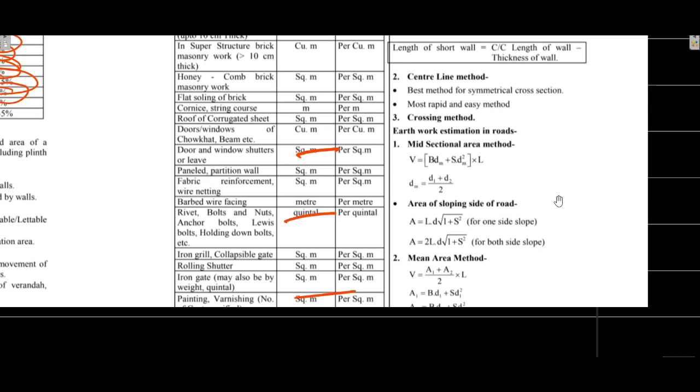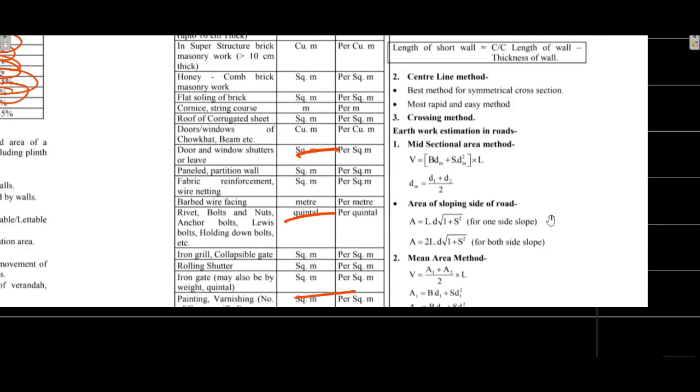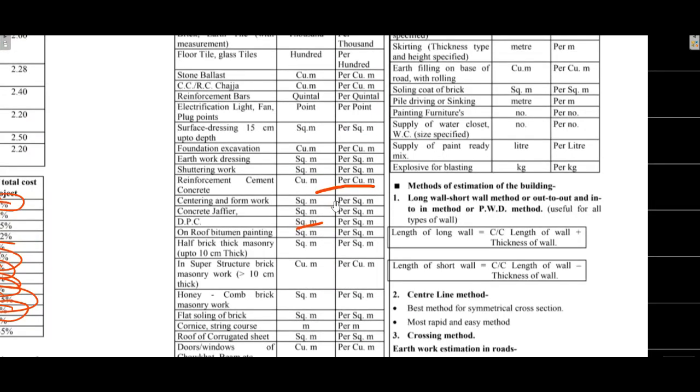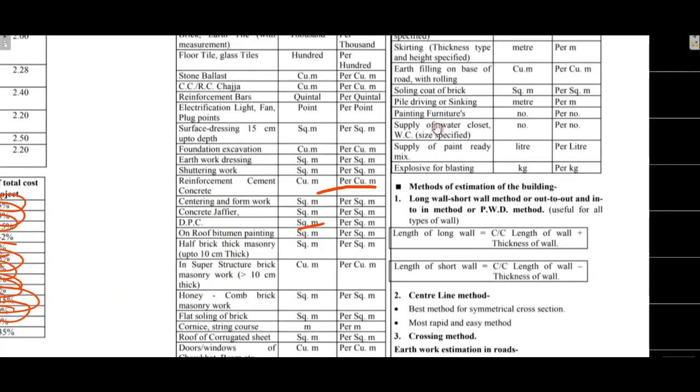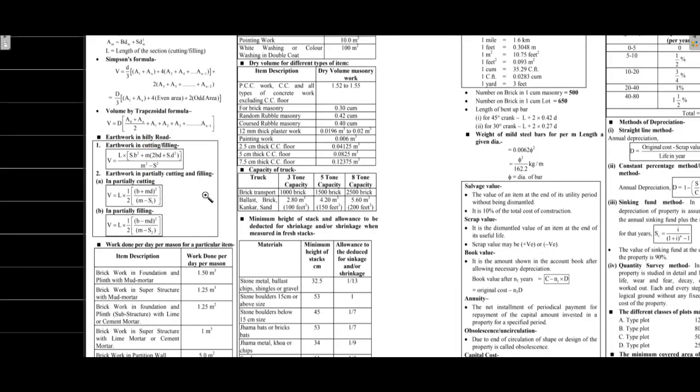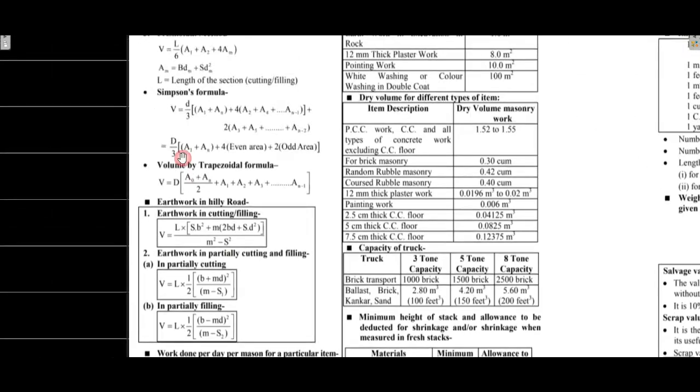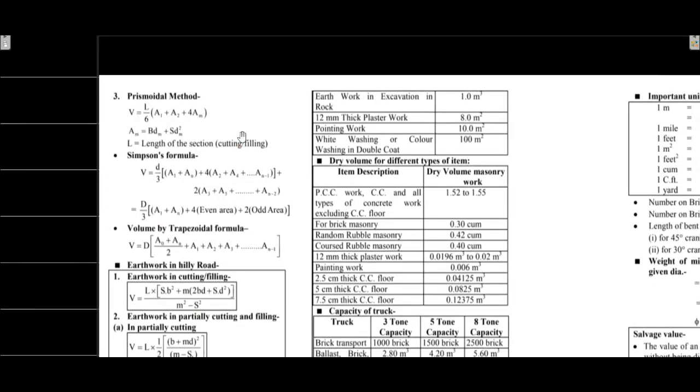For earthwork estimation, mid-sectional formula is D times M plus SDM square into L. For sloping sides, mean area method formula is used. Prismoidal formula is L by 6 times A1 plus A2 times 4 times area M. Simpson's rule is D by 3 times 4 times even area plus 2 times odd area plus A1 plus AN.